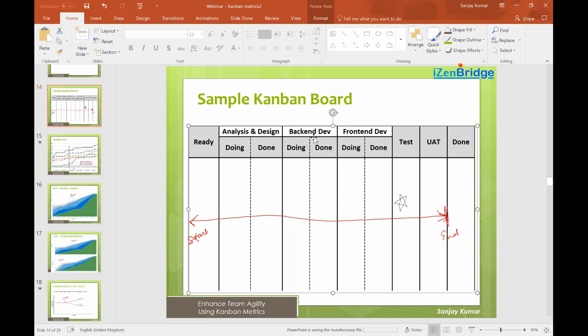Question: which tool is best for generating CFD? If a tool supports CFD, then use it — Jira and most tools with Kanban support provide CFD. The challenge is with other metrics: they typically don't give lead time distribution or control chart. Swift Kanban and Kanbanize are the most mature tools for Kanban metrics. Question: how do you identify blockers using CFD? CFD cannot display blockers directly — blockers are visible on the board. However, if there are too many blockers, those items may contribute to the tail of the lead time distribution.